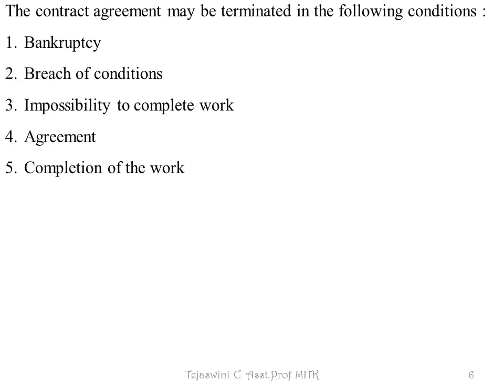Now we will see what is Termination of Contract. The contract agreement may be terminated in the following conditions: First, Bankruptcy. Second, Breach of Conditions. Third, Impossibility to Complete Work. Fourth, Agreement. Fifth, Completion of Work. Any contract will be terminated based on these five conditions.